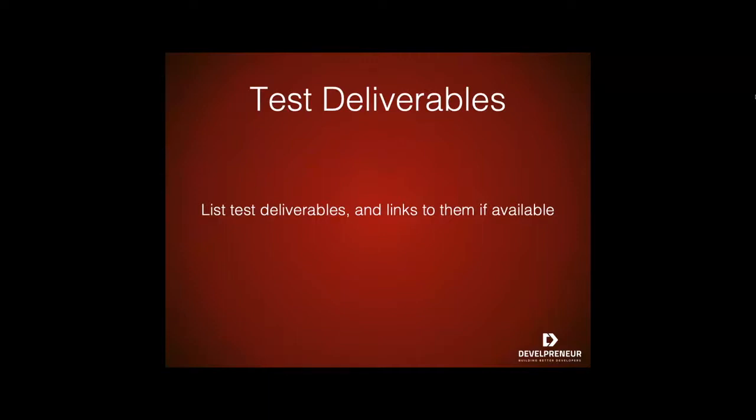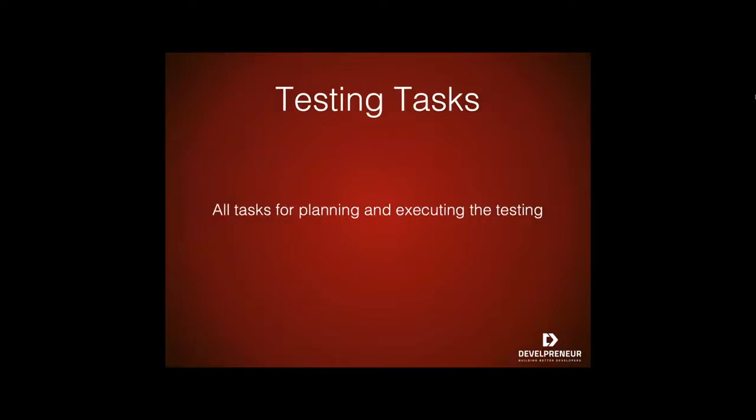These items need to be identified in the overall project plan as deliverables or milestones and should have the appropriate resource assigned to them in the project tracking system. This will ensure that the test process has visibility within the overall project tracking process and that the tasks it takes to create these deliverables are started at the appropriate time. Any dependencies between these deliverables and the related software deliverables should be identified. If the predecessor document is incomplete or unstable, the test products will suffer as well. So it's just really critical that you make sure that you have all the documents in place before you start building the test plan, or you could potentially be building test deliverables on something that is either not complete or not finished. Next, we have testing tasks.